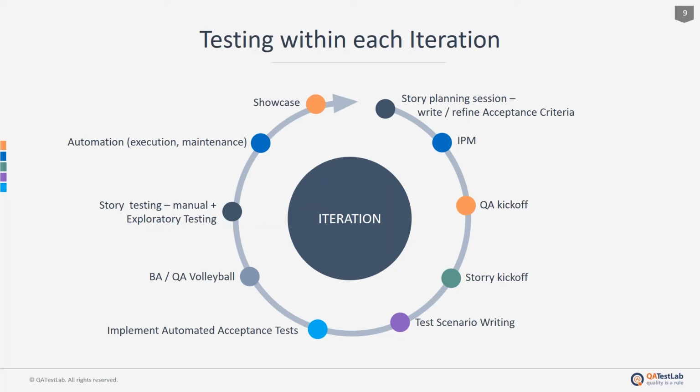And next step, each QA will then sign up for testing specific stories. In case of a distributed team, a good guideline to follow is that the QA team should sign up for stories that the development is in the same location.